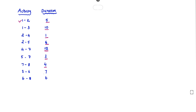Then 3 to 6: duration 7. Then 6 to 8: duration 6. So we have to find out the critical path and critical duration. Now we have to draw the network diagram. The path containing the maximum duration is called the critical path and the duration is called the critical duration.